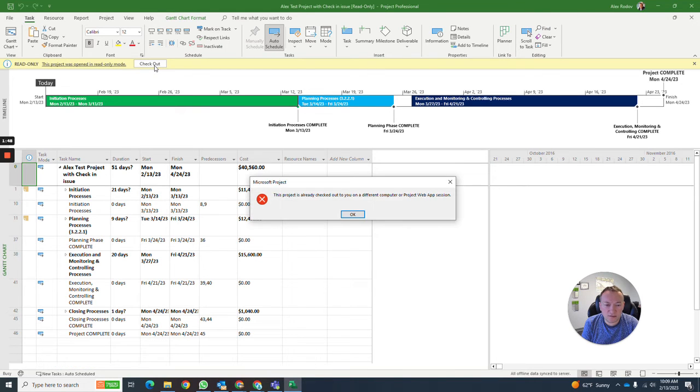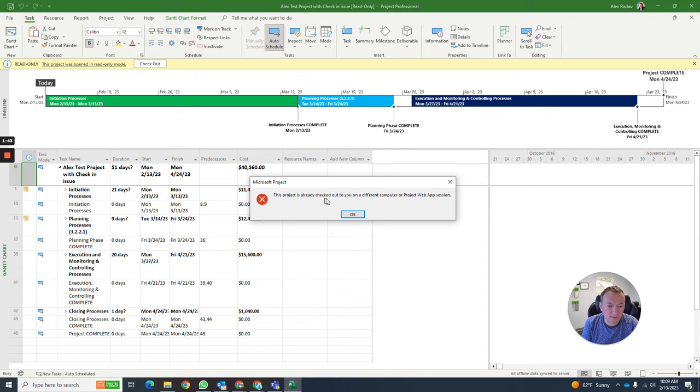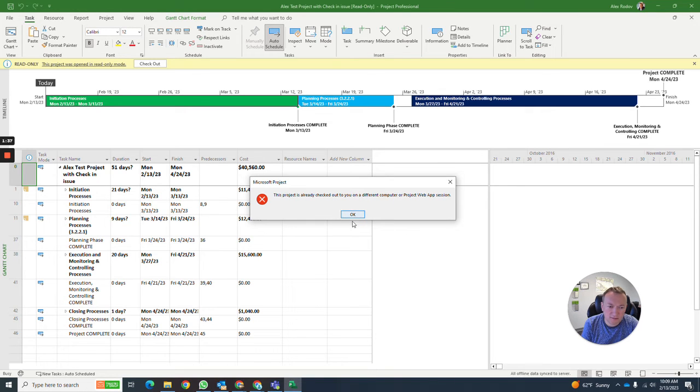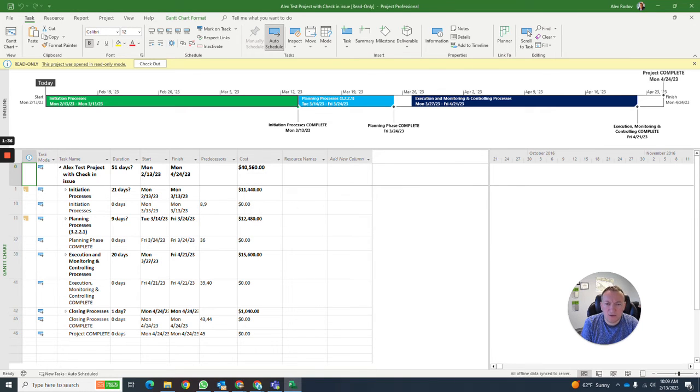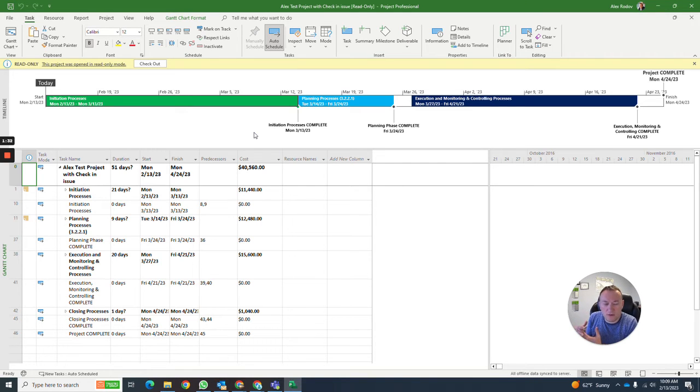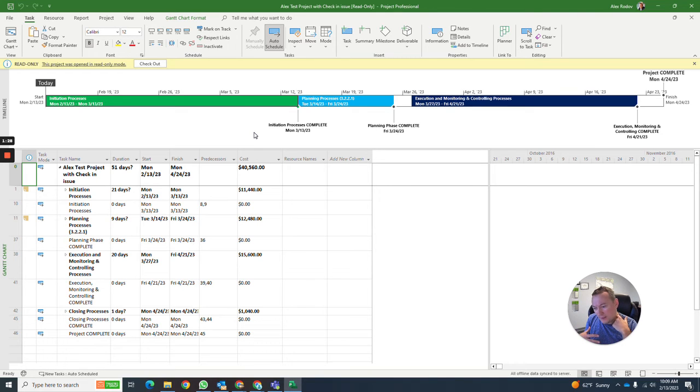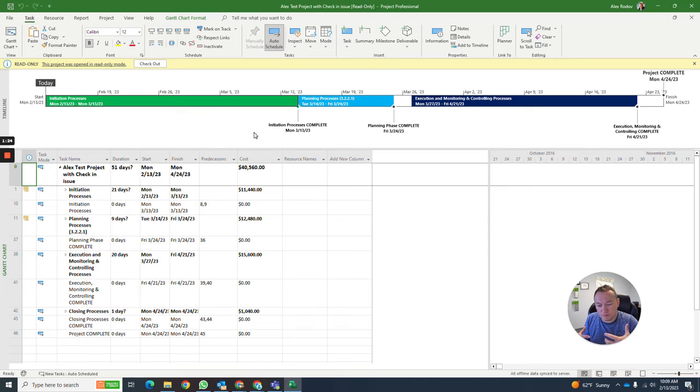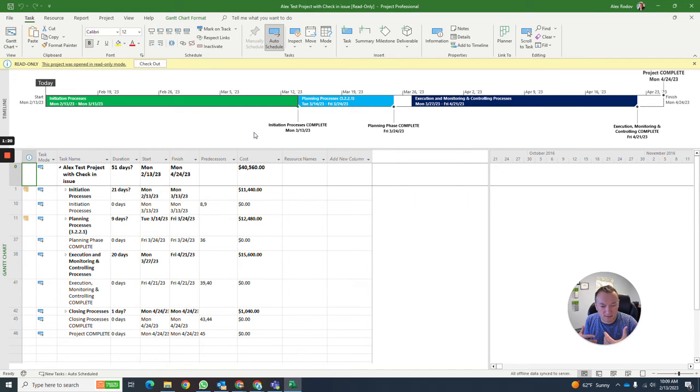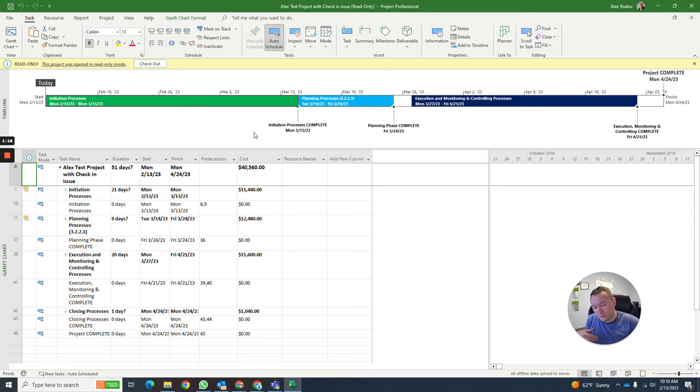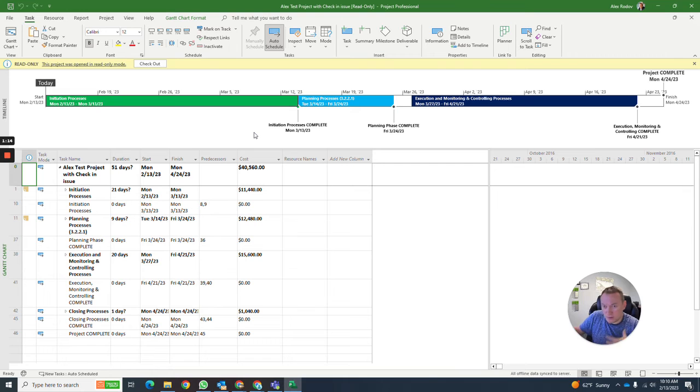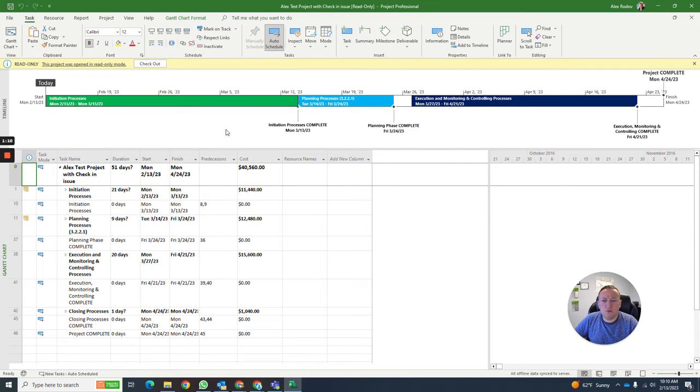The project opens in read-only mode. You should attempt to do it again. This project is in read-only. This part is already checked out to you in a different computer. Like, what computer? But in reality, what happened is you had it created online. It has the online session checked out, and you're trying to open the same project in another session, which is your desktop session. Even though this is the same computer, for the backend, for the application, these are two different sessions.